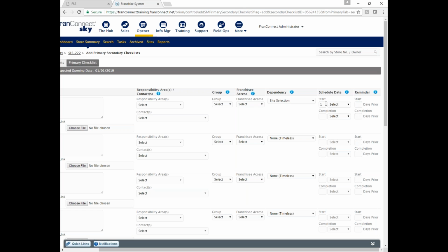Does it start the very next day? Okay, I'm going to put 1 day in there so that I know it starts 1 day after site selection. If I don't know the date for site selection yet, this won't have a date associated with it until I know one. And then I can say this takes 3 days, so it's going to end 4 days after this milestone. Did I answer the question you asked, or would you like to try and rephrase it? Good deal. You got it.